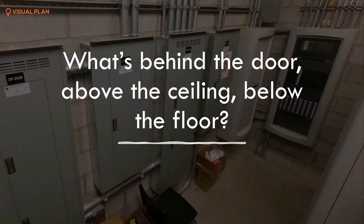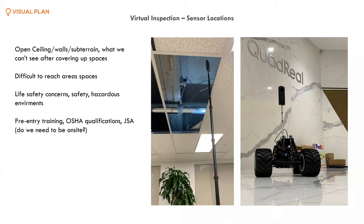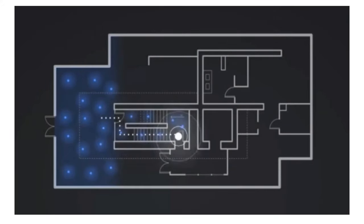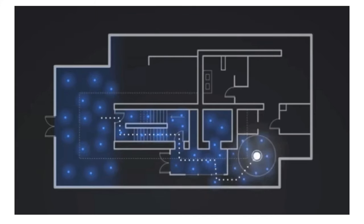What's behind the door, above the ceiling, below the floor? Without a good tool to capture and visualize, it's really hard to locate things accurately. On another project with a sensor company, we needed to locate gateway sensors above drop ceilings — and nobody really likes taking ceiling tiles out. I personally had to remove about 30 or 40 tiles on the first floor just to locate five gateway locations. We used a 360 rover to document at two feet, capturing locations even under workstations. The process involves walking through with a camera, tripod, rover, or drone, photographing at walking speed and processing that into measurable digital reality capture.